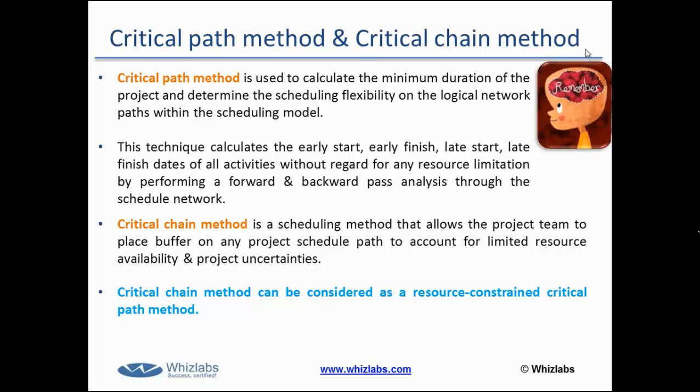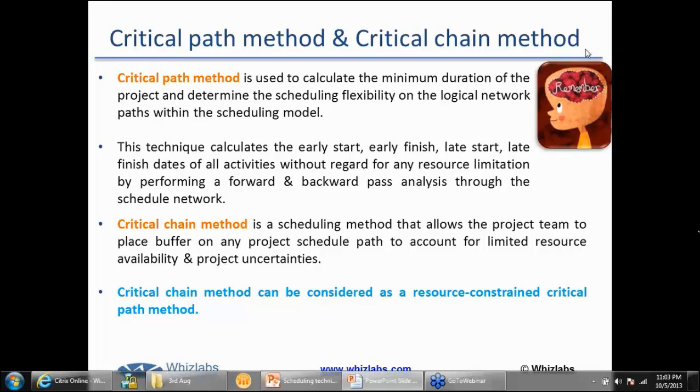If I simply define critical path, I would say we would find out how many paths we have in a project schedule network diagram, how many ways we can reach the project end date from the start date, and we would find out the path which has the longest duration. With the help of this method, we would be able to find out which path has the longest duration and which path actually indicates the total duration of the project. That is the gist of critical path method.